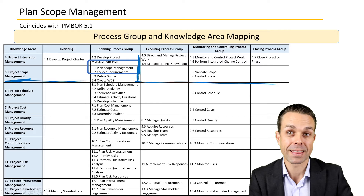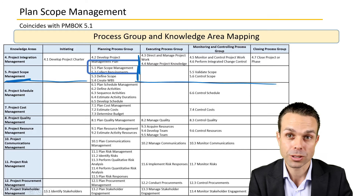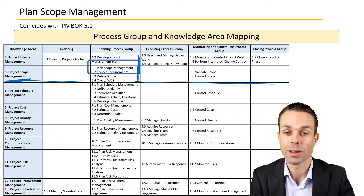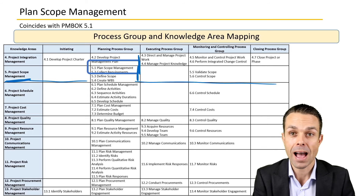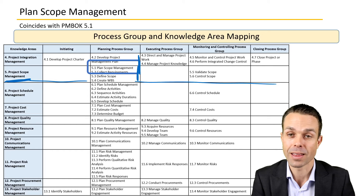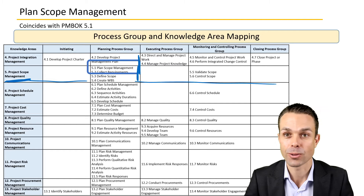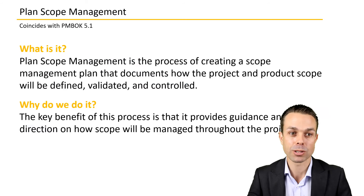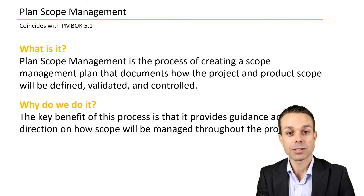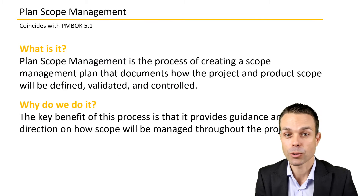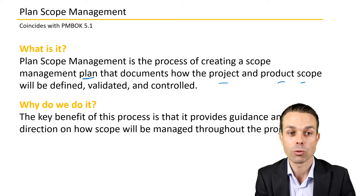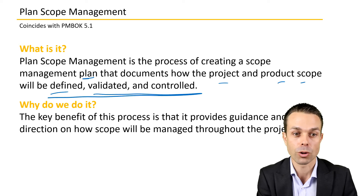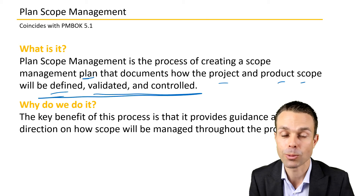This particular process is where we're actually planning the approach to how we will manage the scope. We're not necessarily gathering it just yet, but we're planning how we will gather it and the approach that we'll take. Plan Scope Management is the process of creating a scope management plan that documents how the project and product scope will be defined, validated, and controlled.